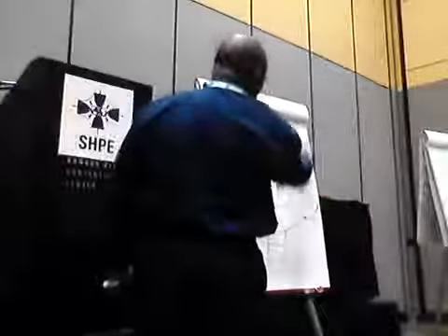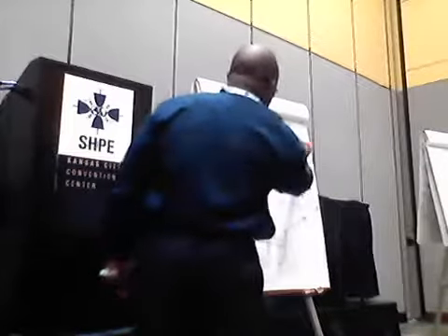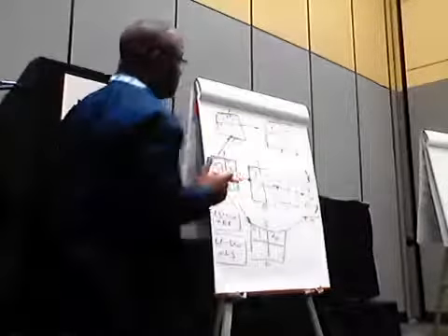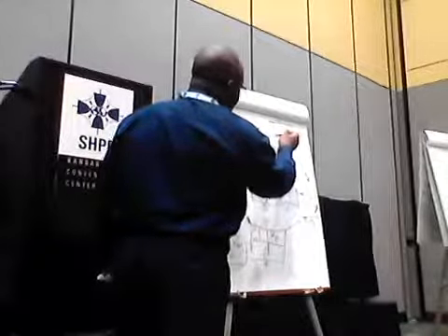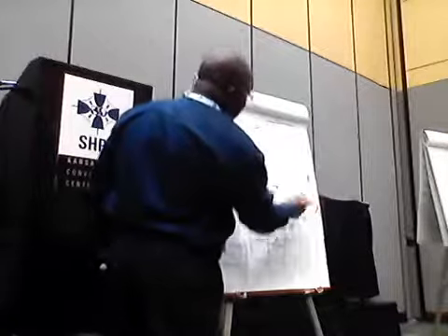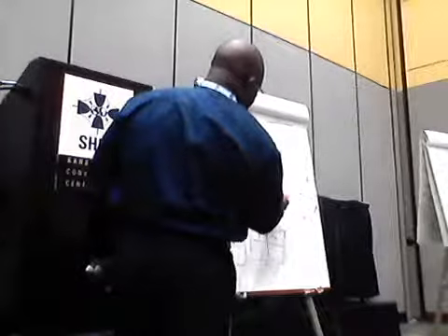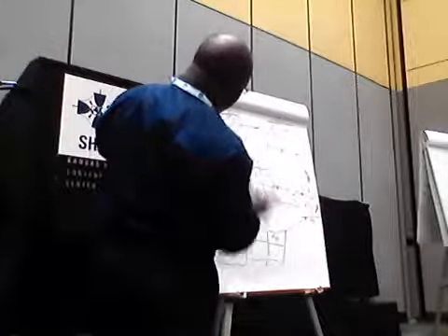This 15 is going to go into the task that came before it. So you're going to take the late start of this. The late start of this is going to become the late finish of this. Okay? Then we're going to subtract: 15 minus 6 is 9. We're going to take the 15 and put it here. 15 minus 5, 10. Take the 10, put it here. 10 minus 9. Good. Now, we're not just going to do this.